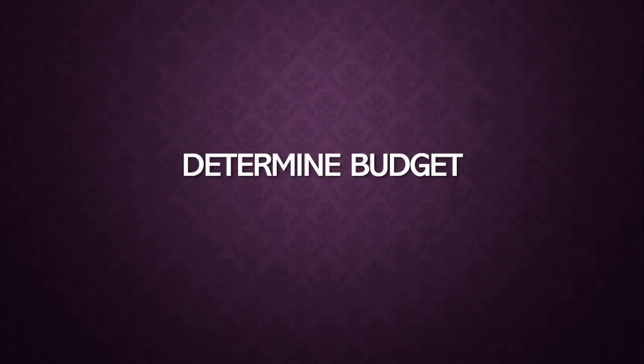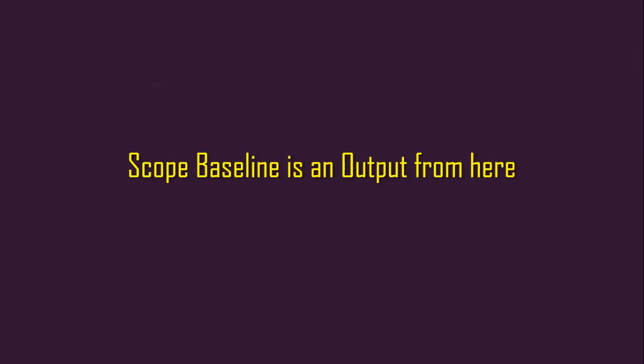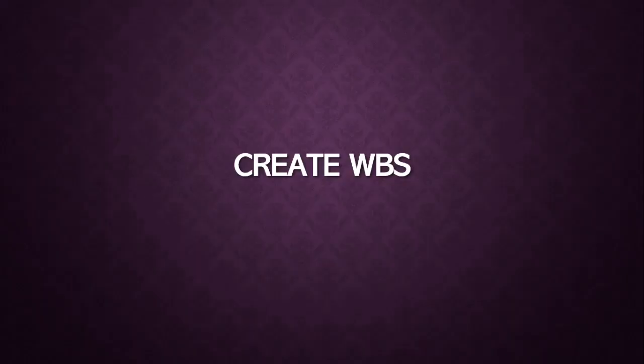Here's your final question for today. Scope baseline is an output from here. Which process are we talking about? Three, two, and 1. All right. The answer to this one, the scope baseline is an output of the create WBS process.